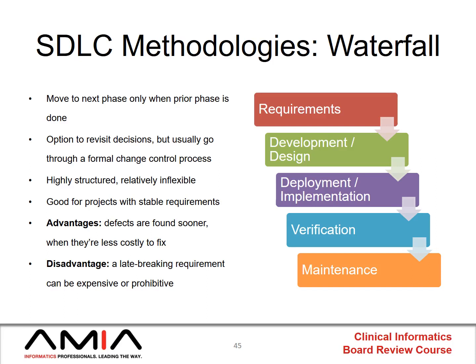So you do all your requirements gathering. And then when you're done, you go to development. And then when you're done, you go to deployment. And then finally verification, and then finally maintenance. The rigidity of this makes it not that appealing, especially for large EHR projects. And there's a huge disadvantage, which is that a late-breaking requirement can be expensive or prohibitive.